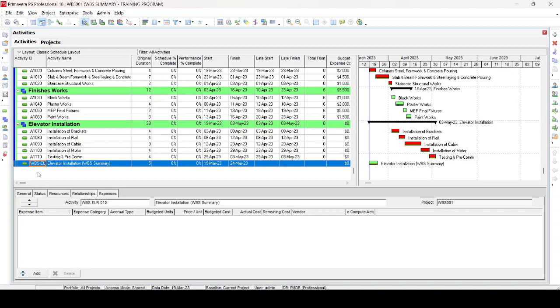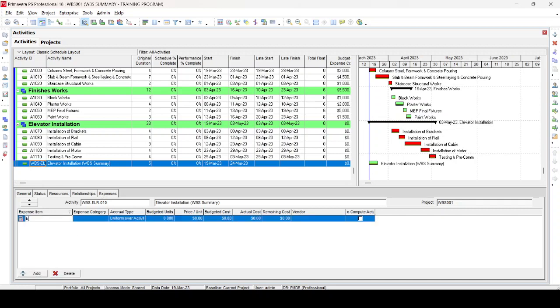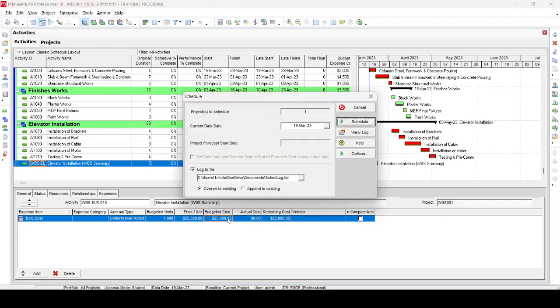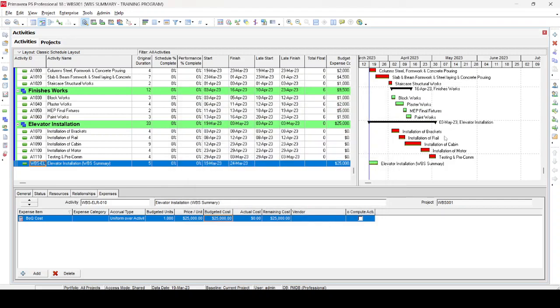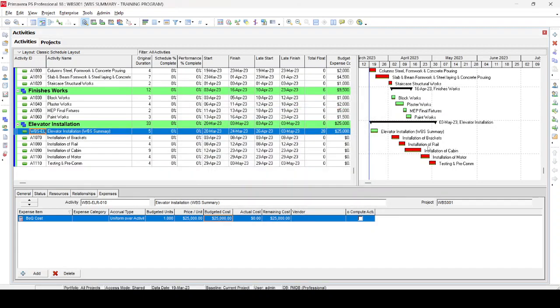Once you make these three changes, come back again to activities. You can see here, then go to expense tab and add BOQ item here, any expense item. I prefer to make it BOQ cost, anything which is appropriate for your project. For me, it's BOQ cost. I assume that this elevator costs $25,000. And then after this, I run it. Press F9. Before running, just observe this column here, this bar chart area, that this activity only covers this duration and is not covering the whole WBS. So I just run it.